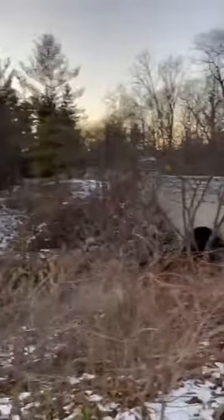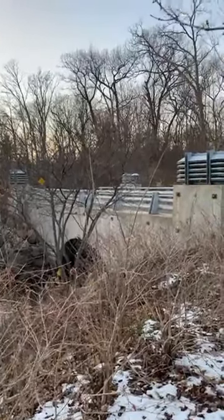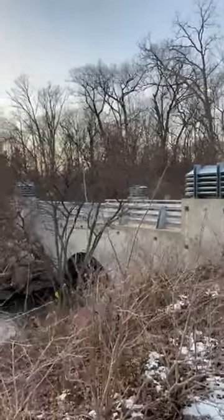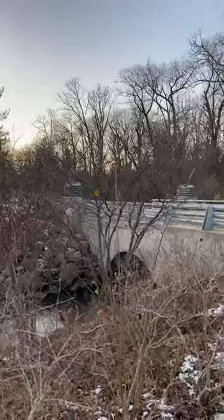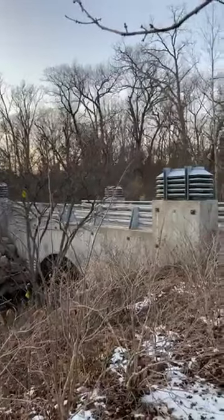And what happened was, okay, you can plan a botanical parkway all you want, but if you have the realities of modern day city planning and the city of Bloomfield Hills saying the road has to be a certain width, it was thought that this concrete bridge for cars was getting way too big, and that for pedestrians to safely cross alongside this same bridge, you would end up needing to make it 8 feet wider. And at that point, it was thought the scale is just way too big. This whole concrete bridge is going to be way bigger than anything at Cranbrook, and we should go back to the drawing board and rethink, how can we make this bridge for cars smaller?